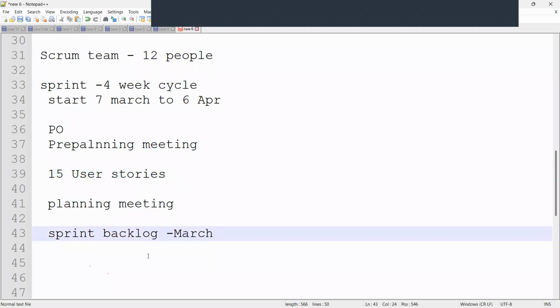For each story, each team member identifies their tasks. If required, they can discuss those tasks and resize them. Then the team has to enter their work and start their work, individual tasks along with their hours. Once the sprint has started, each team member starts working on the tasks assigned.